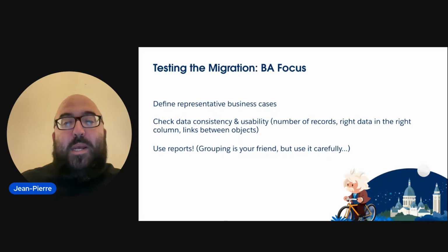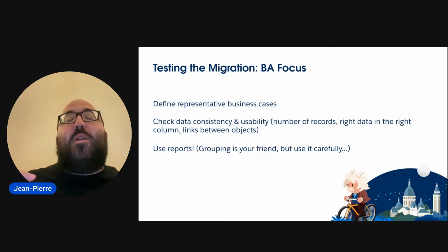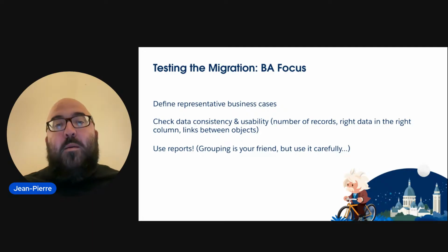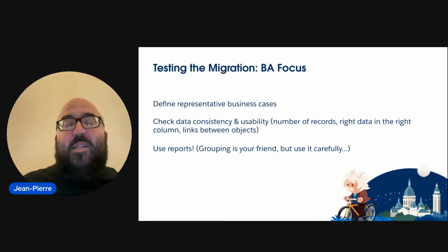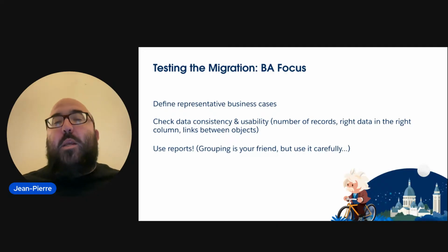You need to make sure that you are reviewing all that. Of course, it can happen down the road that users are blocked by that. But when you test, you actually know what your workaround is going to be, so that on that very first day, when you go live with the product that you're launching, with the data that you have migrated, if there is an issue you obviously could not deal with on the data side, you at least know what to do when it comes to working around that and unblocking users.